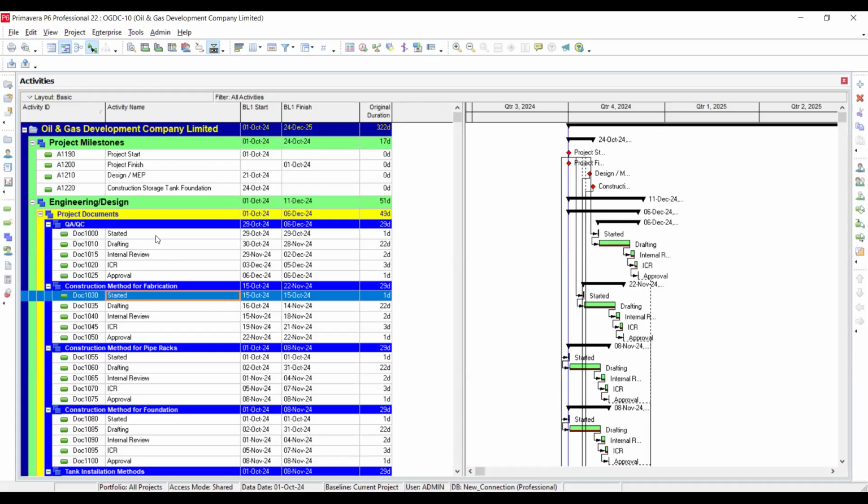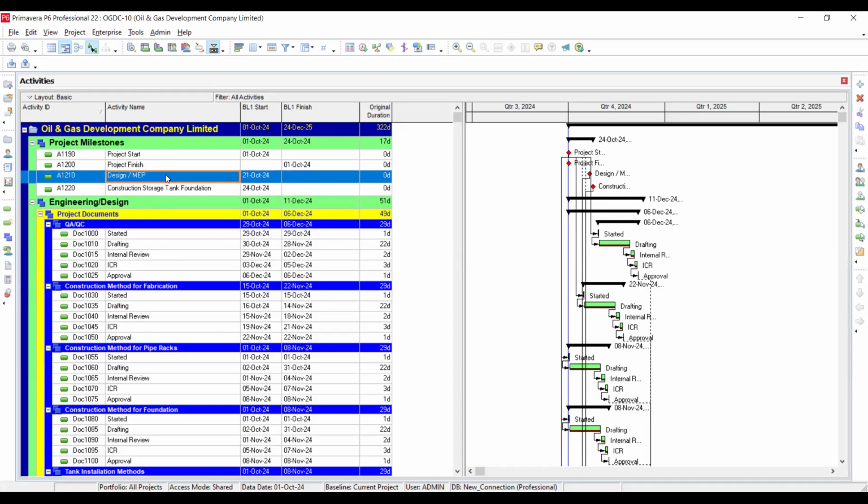So after this, yes, constraints. After this, the application of constraints, yes, there is a big range of constraints. Finishing milestones, if you are going to put any constraint like this one, right? It is not good for CPM, and there is a limit on the application of constraints. You can't put constraints all over your project schedule. You have a limit of 5%, 10%, something like that, or some contractual milestone. Like this is the best way.